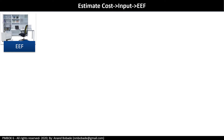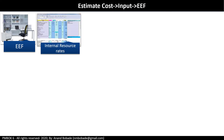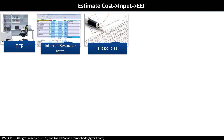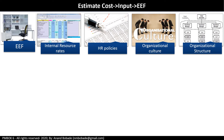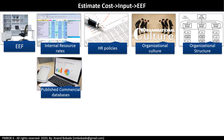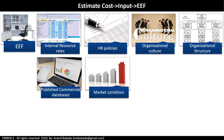Enterprise environmental factors also impact cost estimation. Internal EEFs include internal resource rates, HR policies — especially hiring, releasing, and overtime policies — as well as organizational culture and structure. External EEFs include published commercial information for specific application areas, databases with standard human resource costs and costs for materials and equipment, market conditions that determine standard resource costs, and exchange rates.